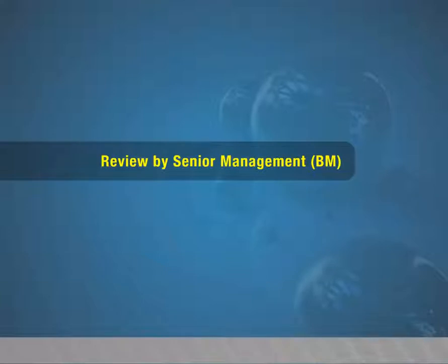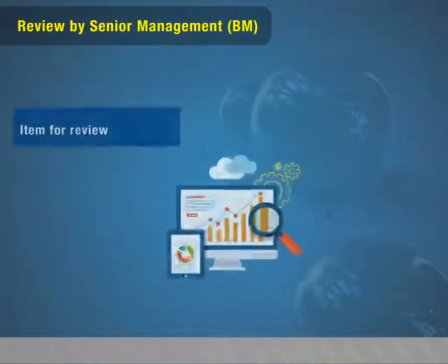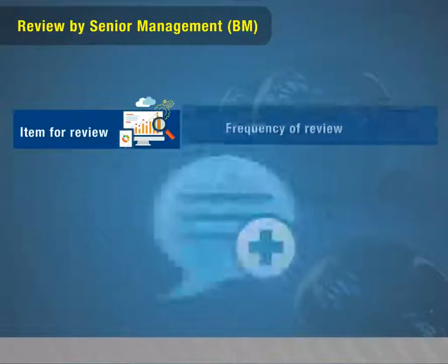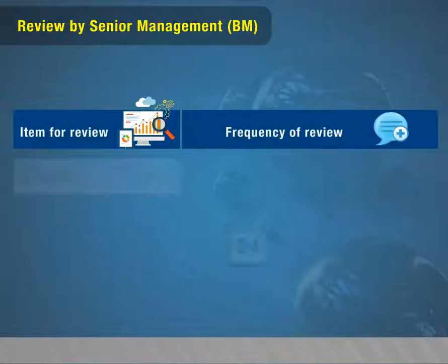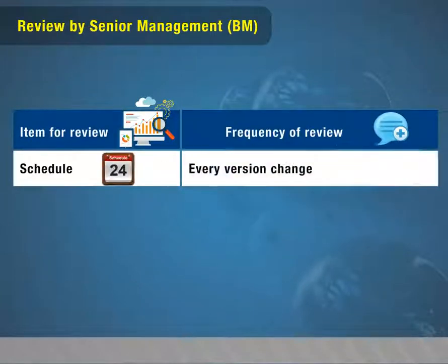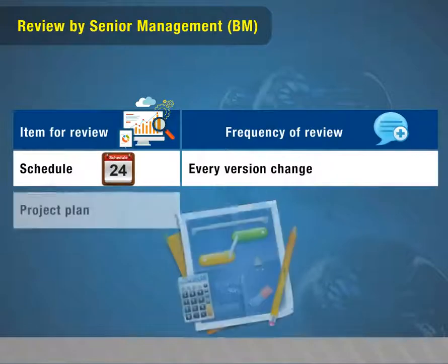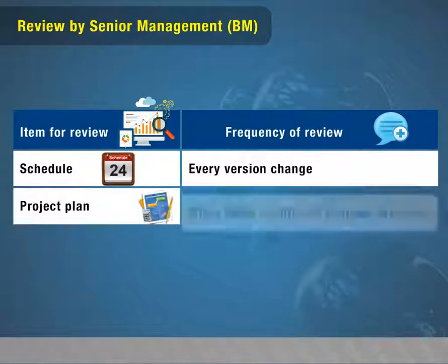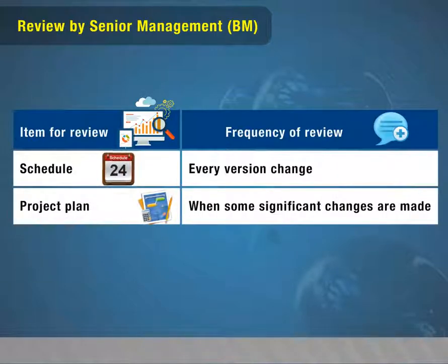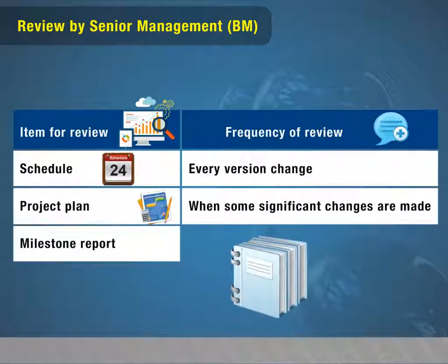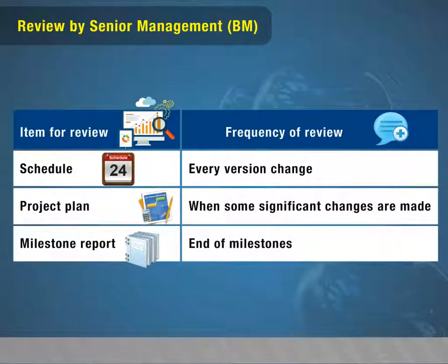Review by senior management, BM. Item for review, frequency of review. Schedule: every version change. Project plan: when some significant changes are made. Milestone report: end of milestones.